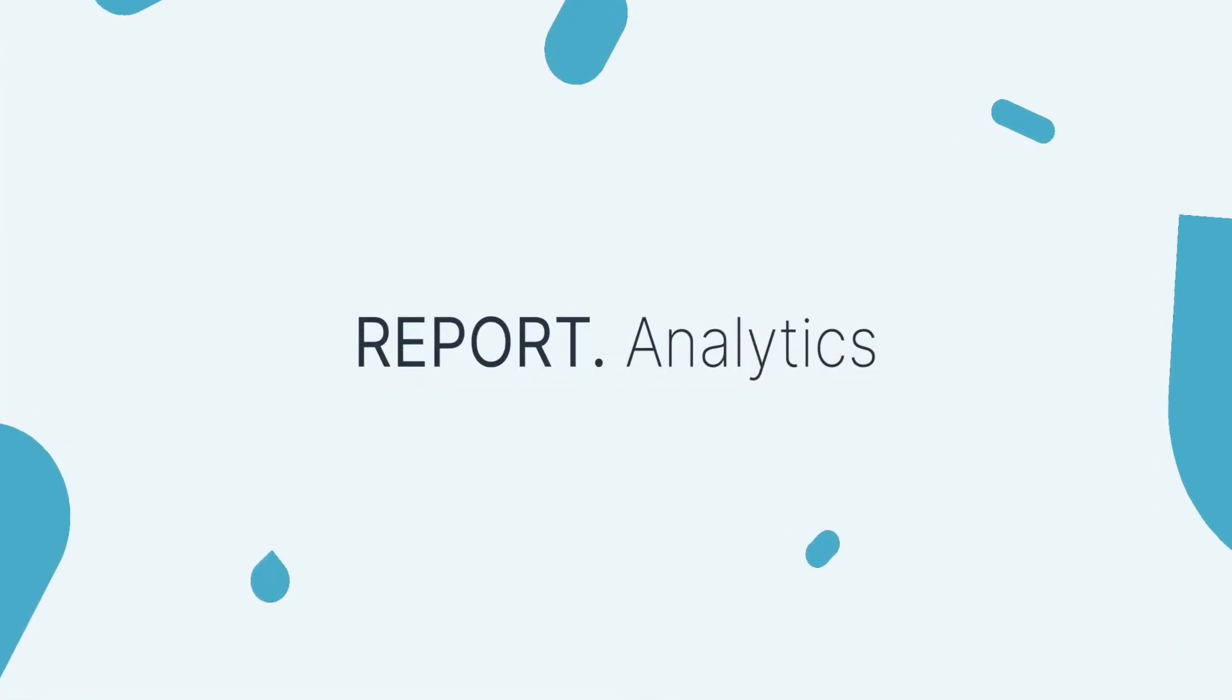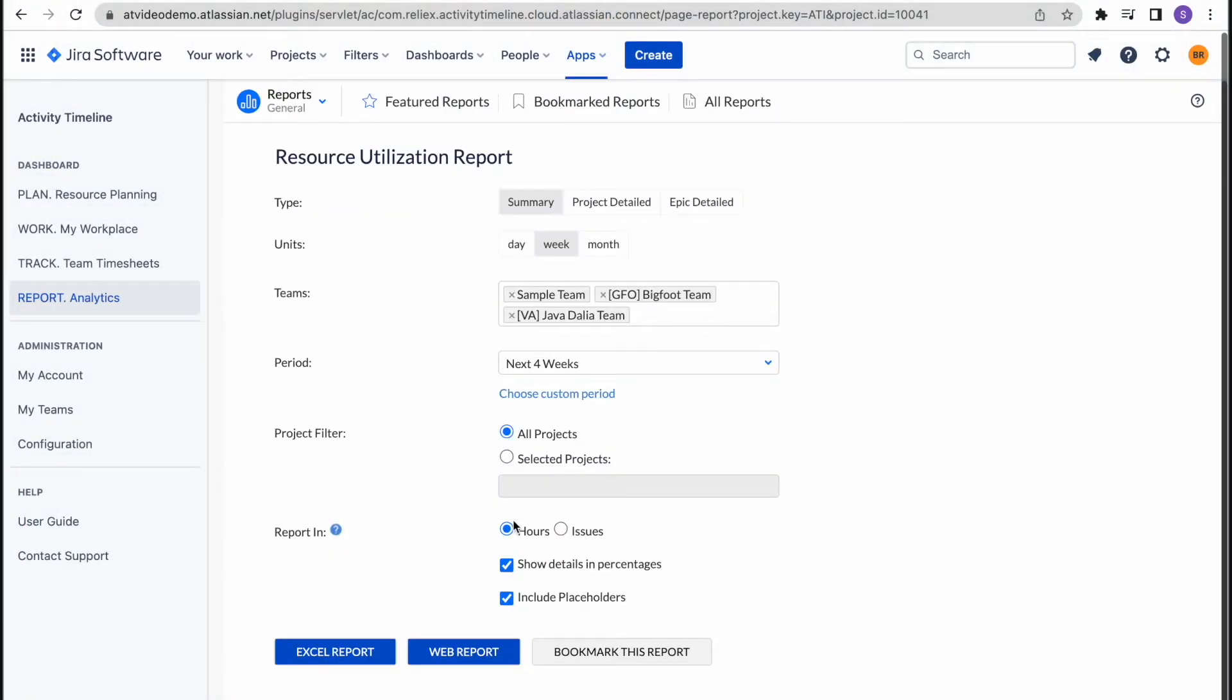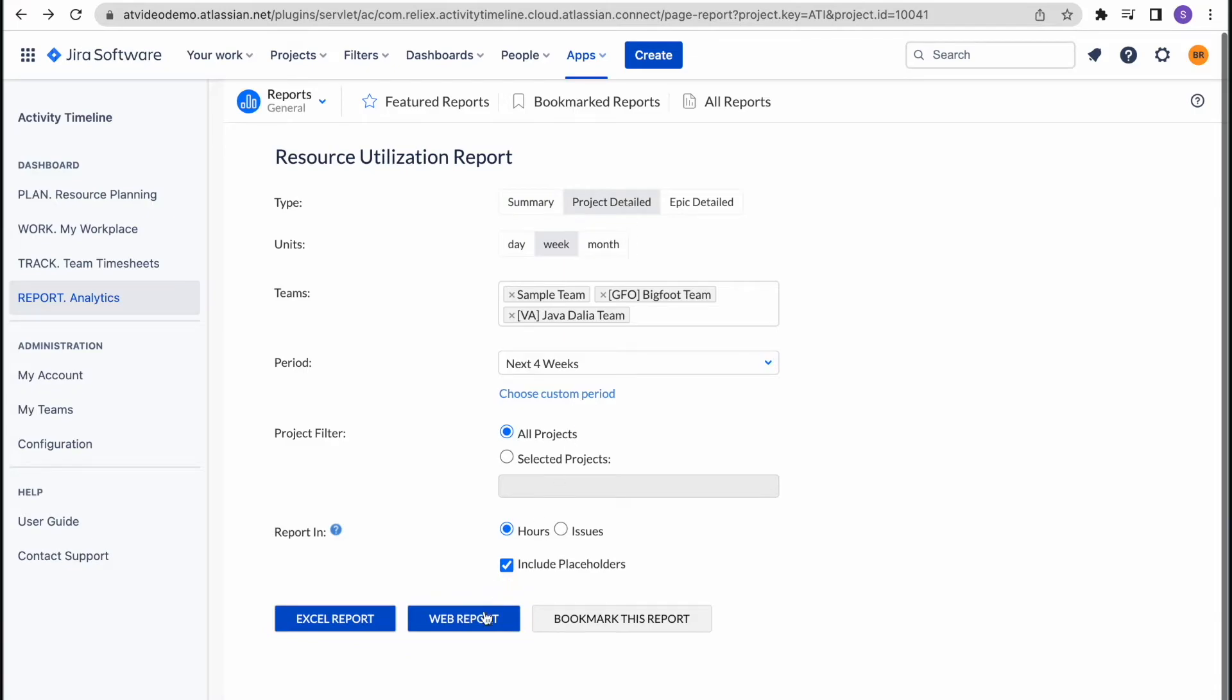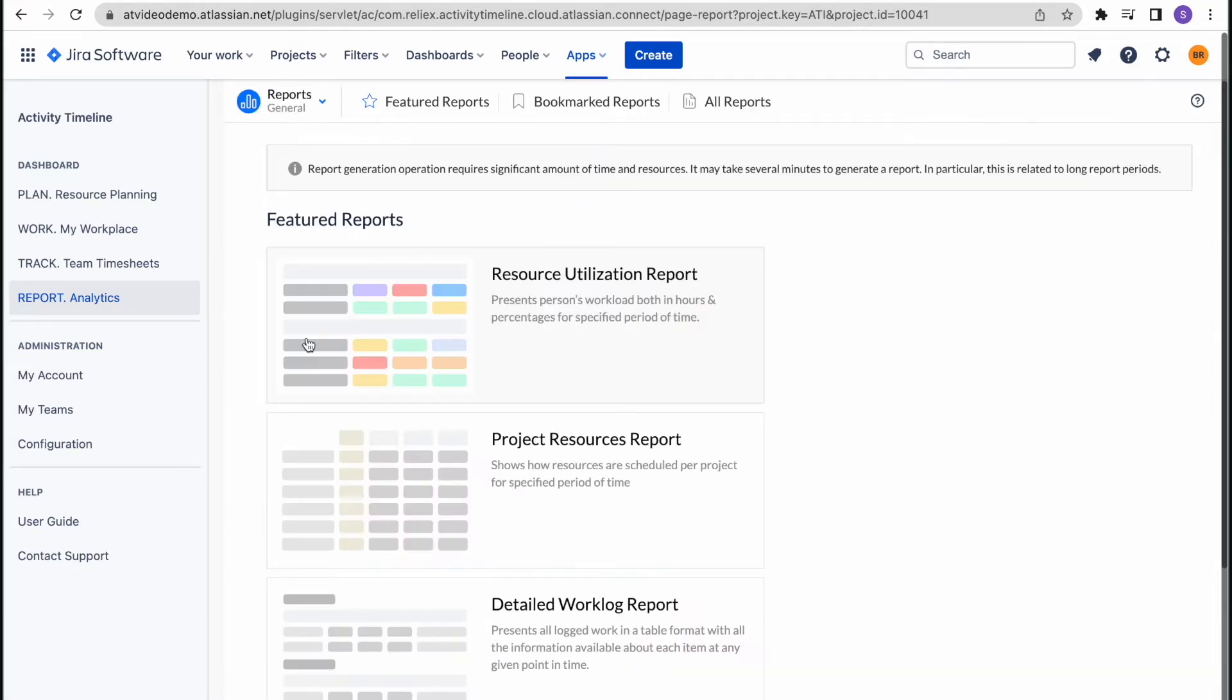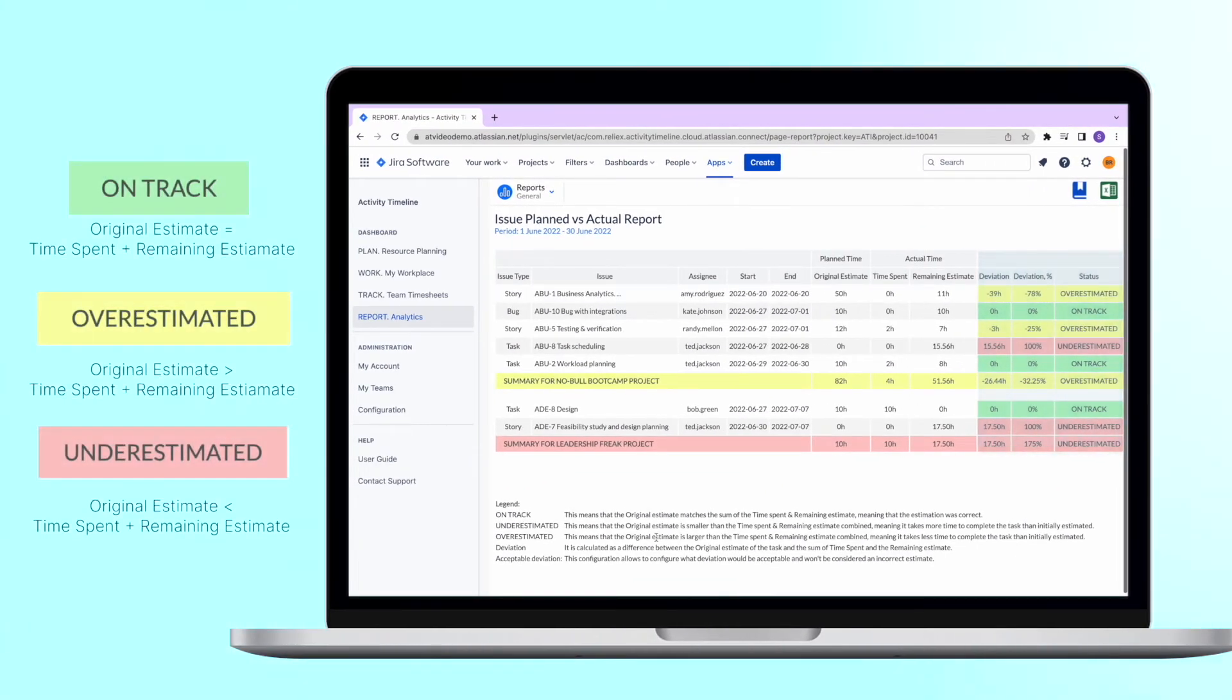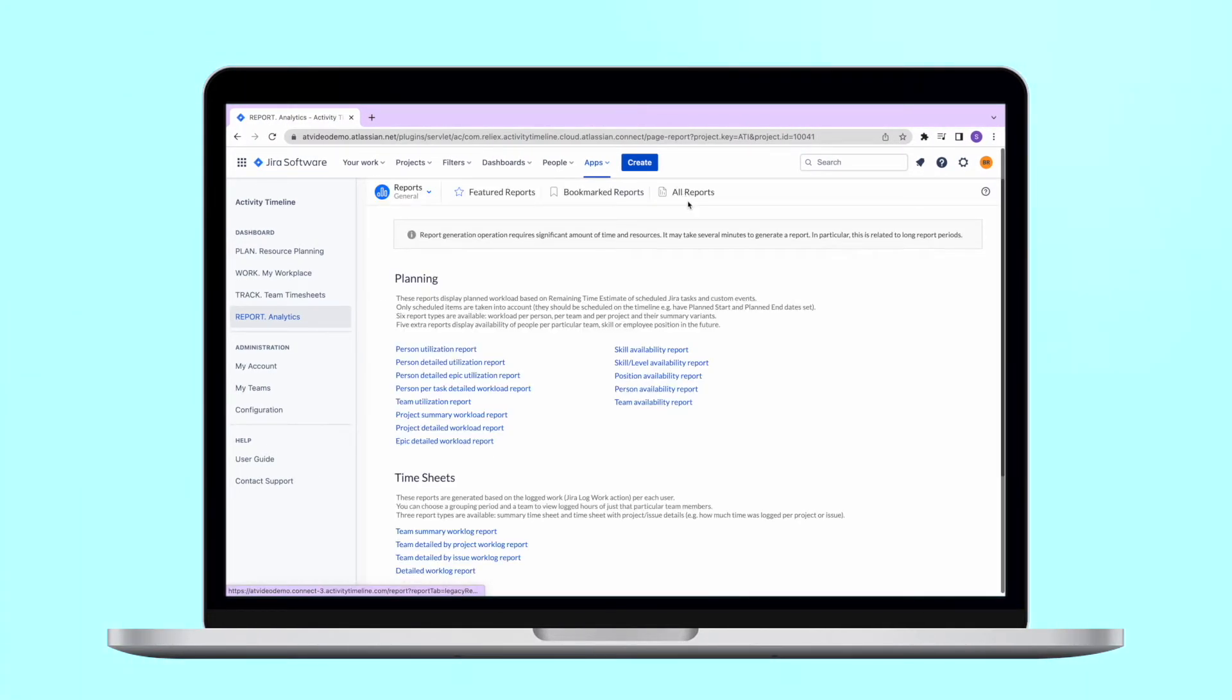Report module. In our analytics module, you have a variety of different reports that allow you to forecast the future capacity of your team on different levels: projects, epics, or even initiatives. Also, use our planned versus actual report to see if your estimates were correct and if your projects are on track. There are reports available for practically any use case related to resource planning.